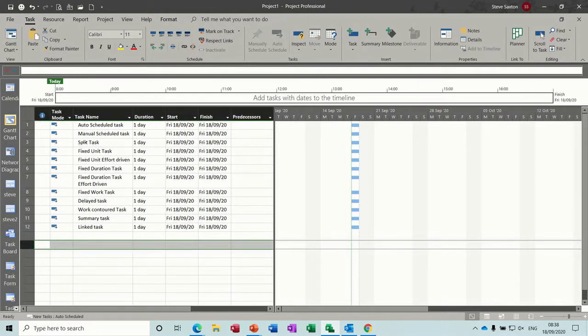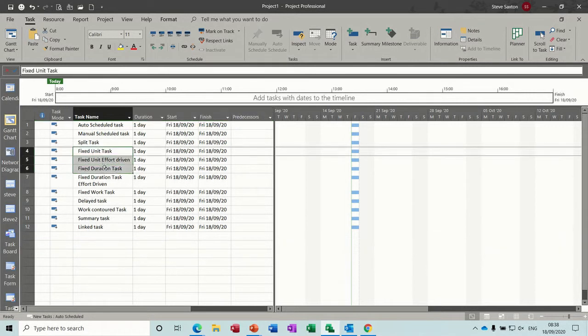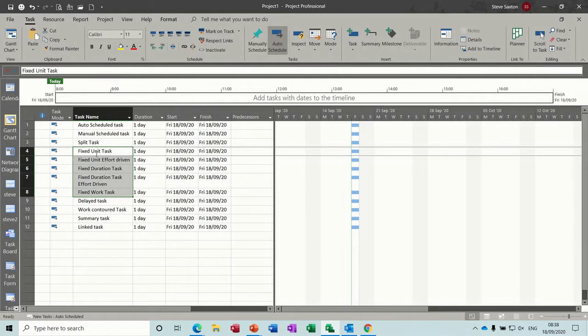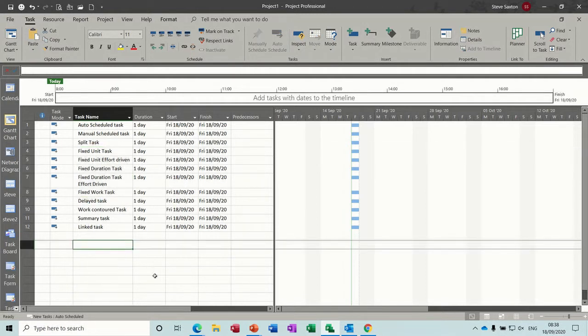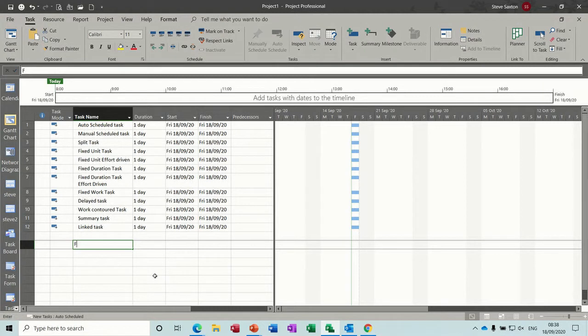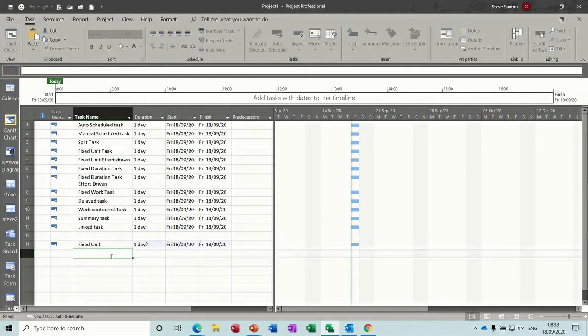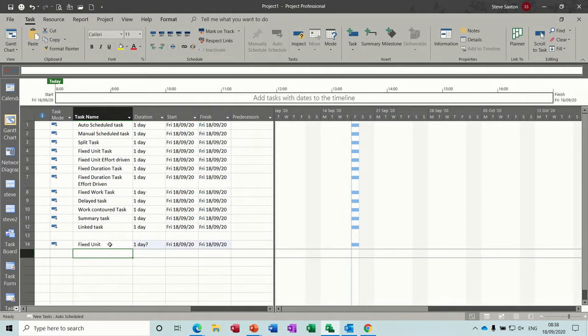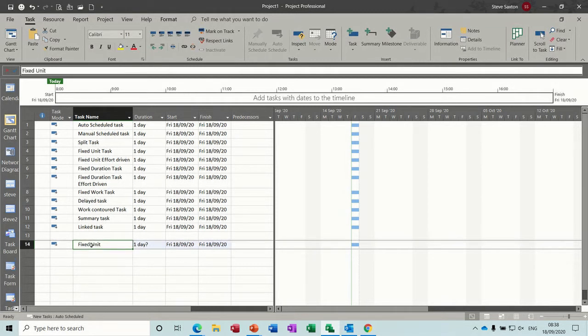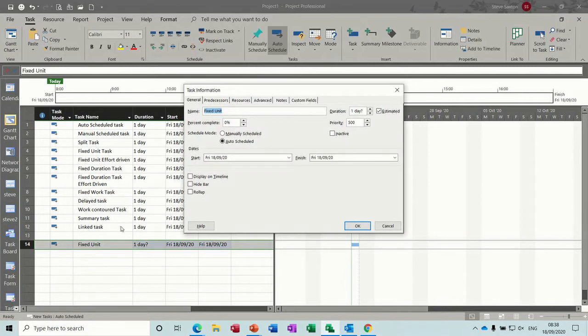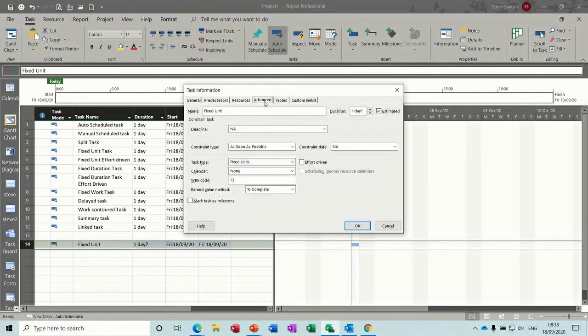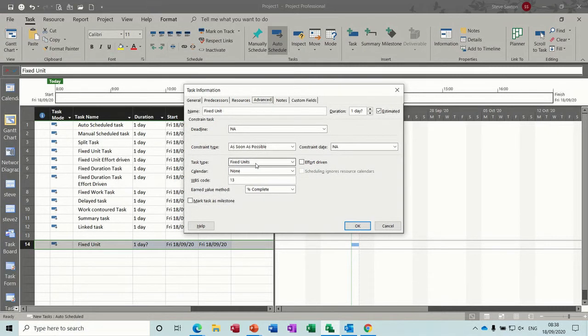The next three are all, or next four, are all from the same place. In fact, there's five of them all together there, look. So the first one says fixed unit. So I'll go fixed unit. This is a default task type. And this you have to find in the task information box. So I'm going to double click on that task information and then advanced. And there you can see fixed unit.